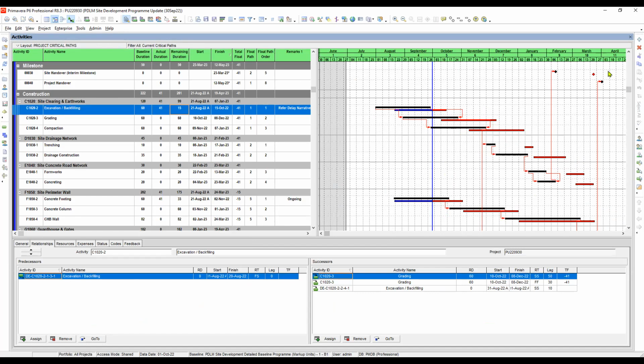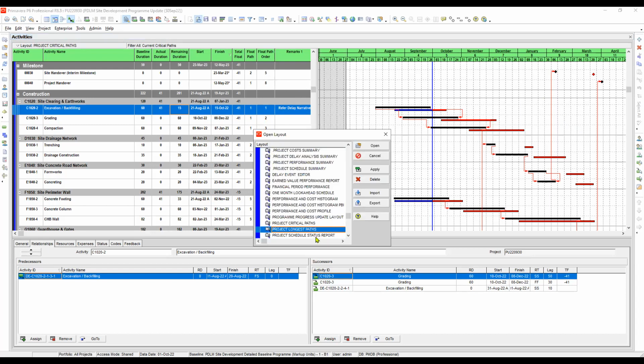One in here, but the longest, as long as they are negative or the total float is negative, regardless of the value, as long as it is negative, they should be called critical activities. But when we say longest path, it should be the longest of the critical activities. So we will look at it. This one is the critical path, so we'll go to the longest one.